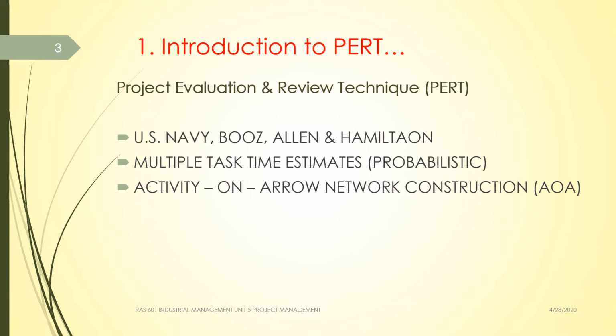If the conditions are all set, that is optimistic, then the time taken in activities is reduced to a certain extent, whereas if the pessimistic time is taken into consideration, then obviously the time taken to complete the activity will increase. And the most likely time, that is again the probabilistic time, is the time guessed by the project leader or project executives